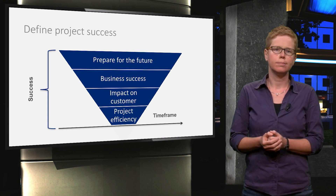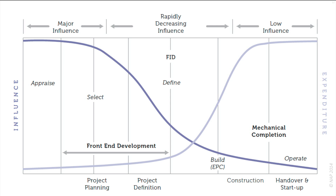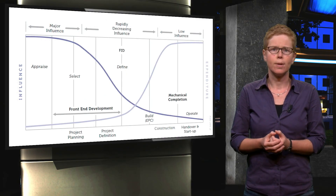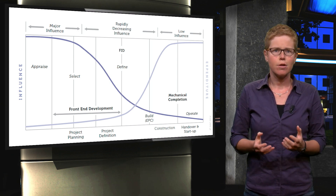Let's now go back to the project lifecycle. The final investment decision — we call it FID — is quite an important milestone. In the early project phase, your level of influence is high and the scope can be changed relatively easily, without too much impact on the overall cost and schedule. At this stage of the project, most of the work performed is just paper-based. In the worst case, a lot of man-hours are wasted if the project does not continue. This is completely different after FID. Then expenses increase quickly, for example because of the ordering of equipment with long lead times. The influence level during the execution phase therefore decreases rapidly, and changes are much more difficult to implement. So defining your project very well is essential for a smooth execution later on. Hence, a thorough front-end phase is crucial.